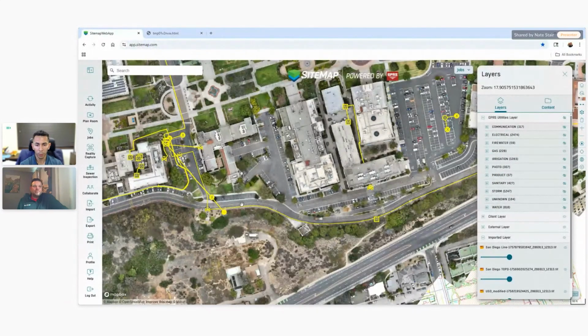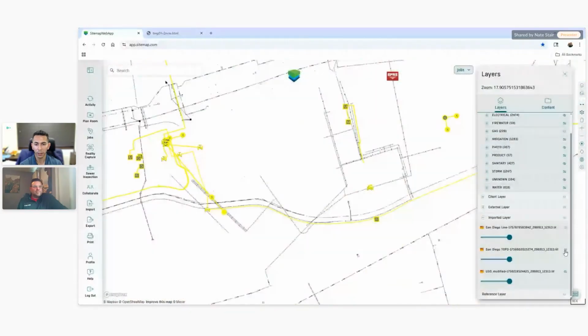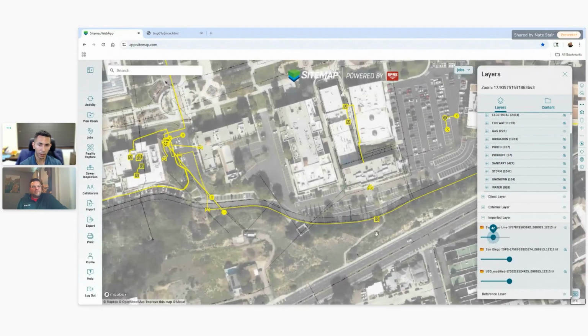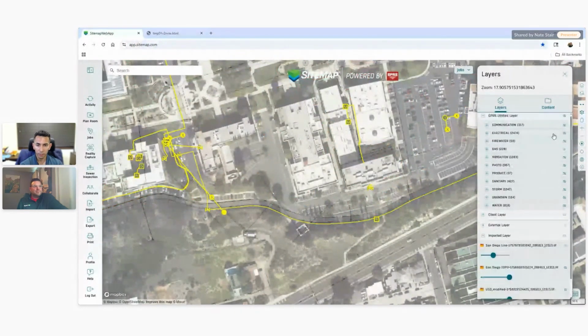So previously it wasn't really mapped on our PDF maps, and if it was, it wasn't, as we'll call it, geographically accurate as it is now. Being able to have it pretty much exactly where it is using GPS is pretty helpful. So that way in the future, I know we'll have a project coming in pretty soon, we can turn this over to the contractor so they know with a bit more certainty where that gas line is, so we're not worried about striking it.